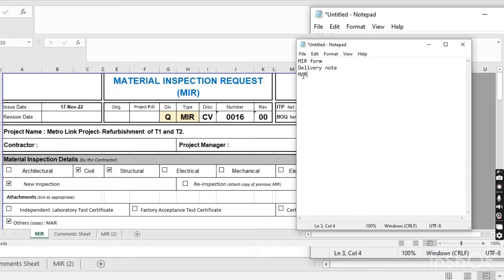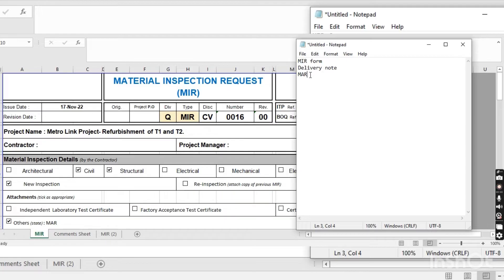After the delivery note, there is the MAR — material approval request. Before purchasing the material, the material approval request should be submitted to the consultant to get approval for the vendor, supplier, and material. When you get approval for the material, then you can go and purchase it. So when you submit the MIR, you have to attach the MIR form, delivery note, and the approved MAR.